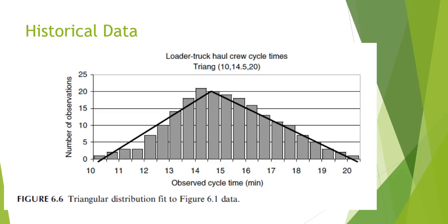And testing the sensitivity means simply that you run the model over and over again. You change one variable, leave everything else the same, and you see how much the answer changes. By that process, you can find which variables have the greatest impact, and also which distributions therefore have the greatest impact on your final numbers.